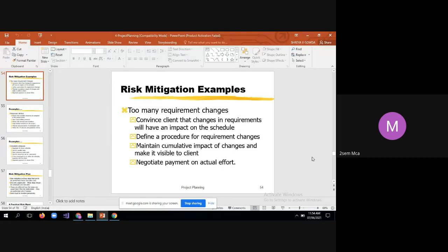You should make it very clear to the client at what stage of project development they can come up with requirements. You should not allow them to come with a new set of requirements whenever they want. You need to have a clear procedure — for example, they can raise new requirements at the beginning stage, or immediately after you deliver one iteration of the software.